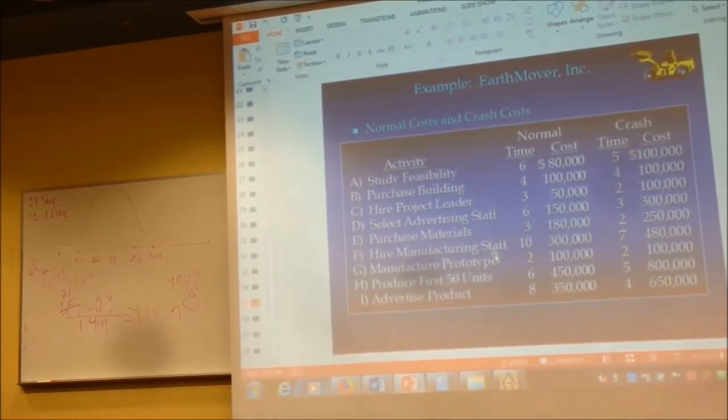You see what I did there? You would do that. Let's go to the bottom one. 4 units of time, additional cost, what is that, 300,000? Take 300,000 divided by 4 per 1 unit of time. Calculators. 25. Say it again, I didn't hear you. 25. Oh, 75, thank you.